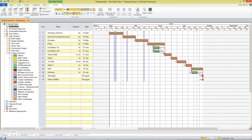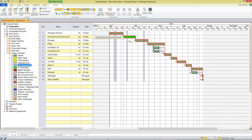I'm going to use the trades contractors folders now just to allocate to my tasks so you can see how it works. I've got some demolition tasks going here. I can allocate the demolition contractor by left clicking, drag and drop onto the task on the bar chart — it's as simple as that to allocate a code and change the appearance of your task. Maybe I'll allocate some ground workers to my project here, dragging and dropping as required.